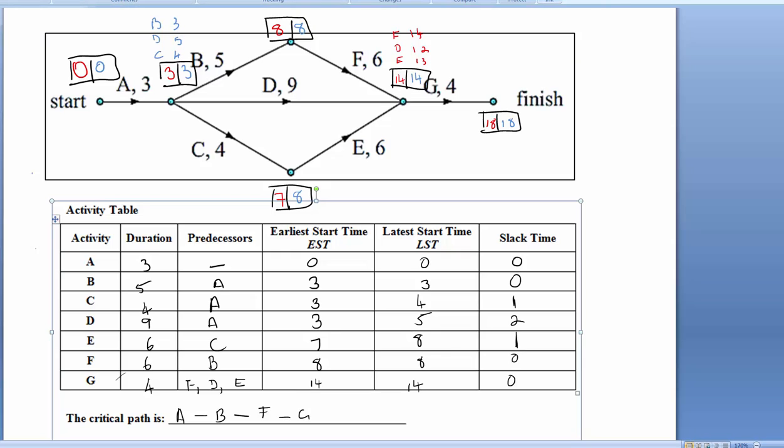Let's change color one last time. We'll go with a highlighter actually. Let's go yellow. So A will be on the critical path, that task there, up to there. You can see here I'm just looking for the vertices where the earliest and the latest start times of the task that's after the vertex are the same. That's our longest path through the project.